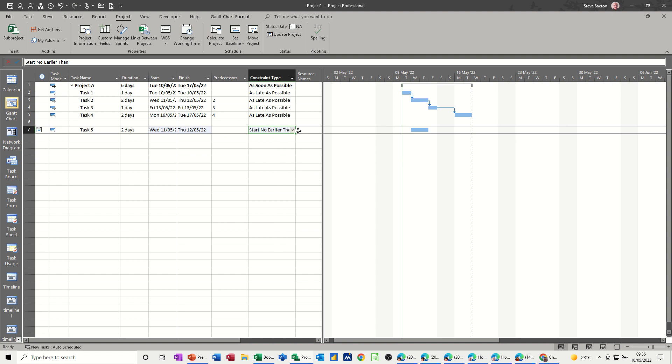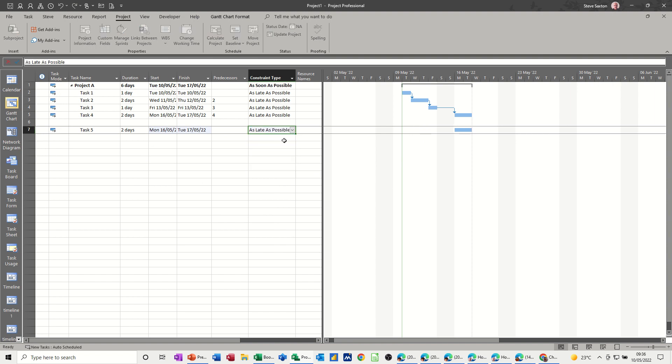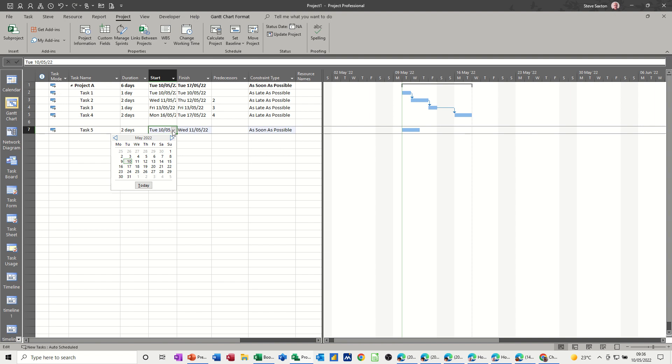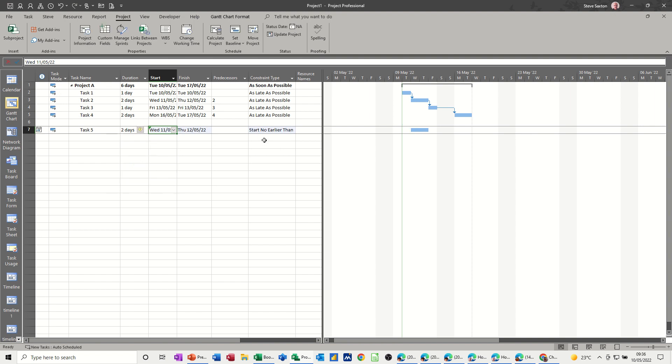The same thing would apply if I put that back to as soon as possible, which is the default. It comes back to today, and that symbol goes, because there's no constraint. Now what happens if I change the date box? If I change the date box to the 11th, again, I get that constraint coming on. Because Project likes to schedule. It is a scheduling tool by default. It wants to do the scheduling based on the links and duration that you've put in. So if you start messing about with the timeline, the dates, it's then making that task more important.